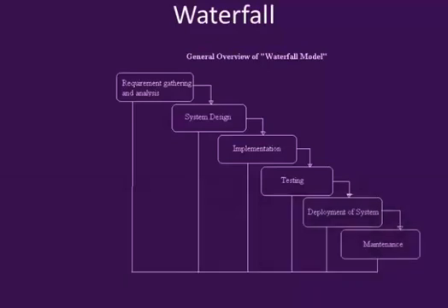The waterfall model. This is probably the traditional top-down engineering model with its familiar Gantt charts. This is essentially what we do when we use MS Project. Each phase must be completed before the next, although if enough resources are available, parallel processing is possible. This model is still used for small projects with limited uncertainty.